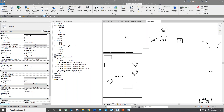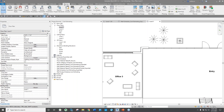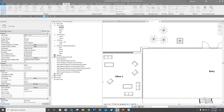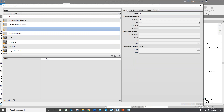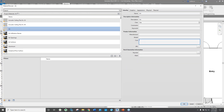The first method we discussed was the material takeoff, and that cost is going to live on your materials. You can path to that from selecting a wall type, or go to your Manage tab and click on Materials. I'm going to bring something up — I know that air is in one of my walls, so I'm going to click on it. Under its Identity Data you will see that there is a cost field. This is where you would type the cost in for a particular material.